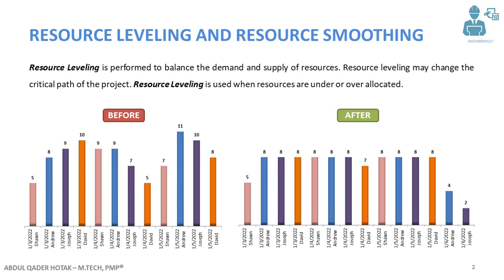Resource leveling is performed to balance the demand and supply of resources. Resource leveling may change the critical path of the project. Resource leveling is used when the resources are under or over allocated.